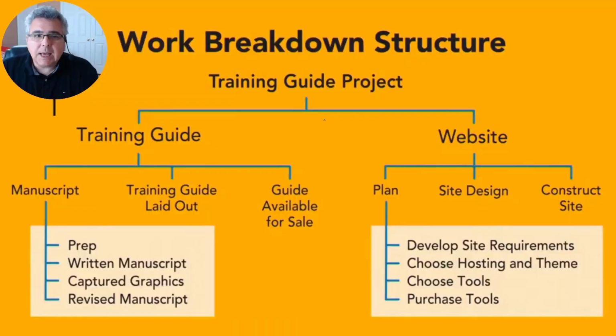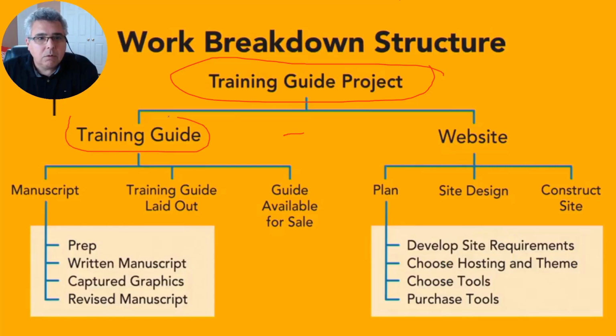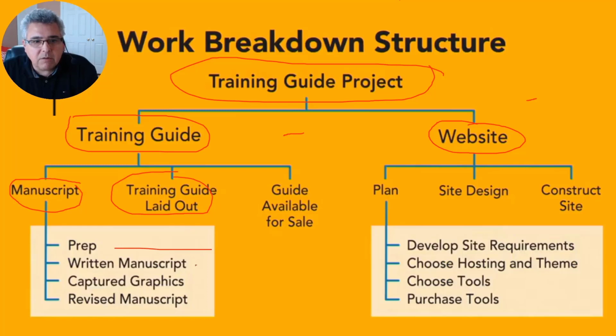What is the WBS? Just to remind us about the WBS and some considerations about it, on the first level here, we have the project title. Then we have here the first level of major deliverables. Then we move to the sub-deliverables, and then we go for the lowest level sub-deliverables. From the lowest level sub-deliverables, we can create the WBS dictionary. The WBS dictionary is our work package. On the WBS dictionary, we can identify the activities, okay?